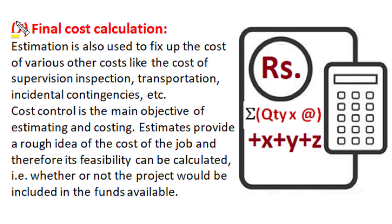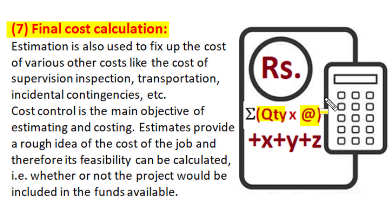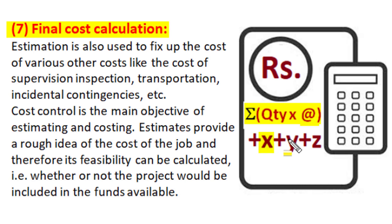Another purpose of estimation is final cost calculation. In estimation we measure the quantity of all material and workmanship, consider the rate of those materials and manpower services, and calculate the total amount of cost involved in all types of material and works. Apart from that, estimation also fixes up the cost of various other components such as overhead cost, supervisory or inspection charges, transportation, and incidental or contingency cost components.